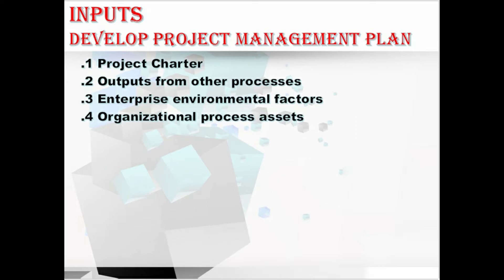In inputs, first we have the project charter. The project team uses the project charter as a starting point for initial project planning, and the type and amount of information in the project charter varies depending on the complexity of the project and the information known at the time of its creation. Hope you understood about this first input. Let's move to the next input.